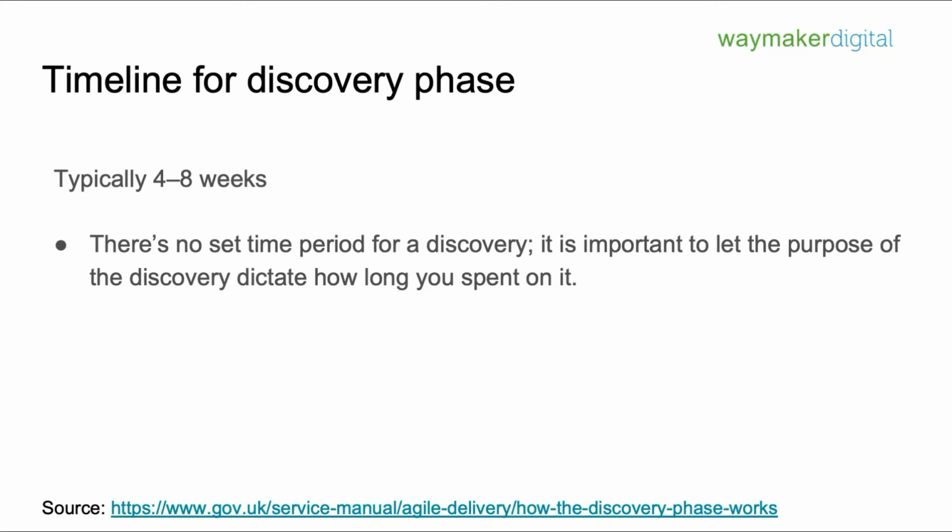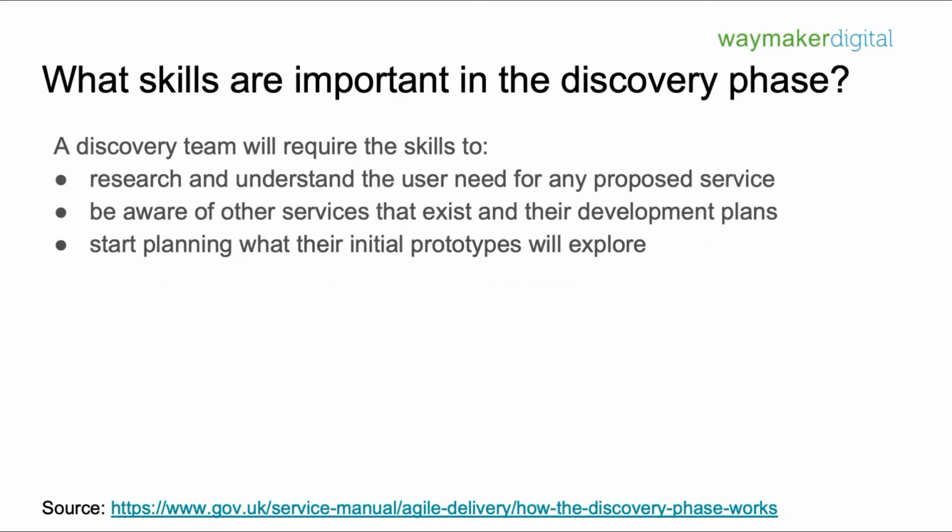So it's important that as a team, you don't set a time based on what is typically done. You allow the purpose of the discovery to dictate how long. However, it's important to have a time frame just to guide your work and allows you some room for flexibility in case you need more time.